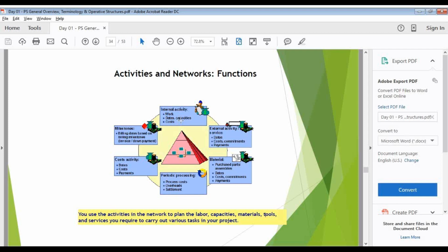Or in CATS, whenever we are confirming through CATS, it will give an error saying that the activity type combination is not maintained for this fiscal year, so and so 2015-2016. From this error we can determine and maintain accordingly, or else the project team, I mean the finance team, will maintain the cost. The rates will be maintained over there for a particular period.